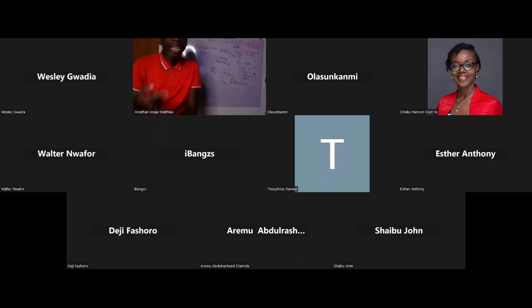So, Mr. Ini, the QS is giving you a BOQ or material and labor schedule, but the person that breaks it down into the WBS is actually you, the project manager, because it gives you control of how you want to manage and work, right? So that's that. Thank you, Mr. Sukomi, for making that comment. It's good, QSs, please know how to do a material and labor schedule. It makes our work easier.